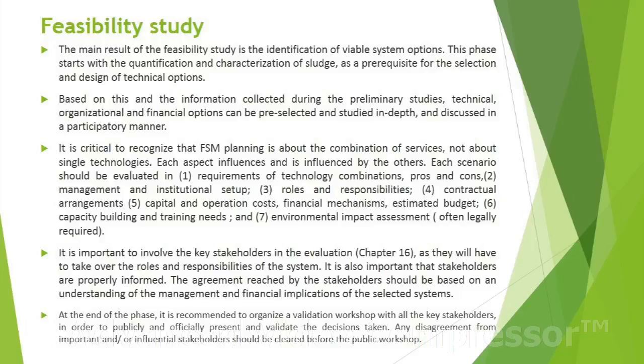It is also important that stakeholders are properly informed. The agreement reached by the stakeholders should be based on an understanding of the management and financial implications of the selected systems. At the end of the phase, it is recommended to organize a validation workshop with all the key stakeholders in order to publicly and officially present and validate the decision taken. Any disagreement from the important and/or influential stakeholders should be cleared before the public workshop.